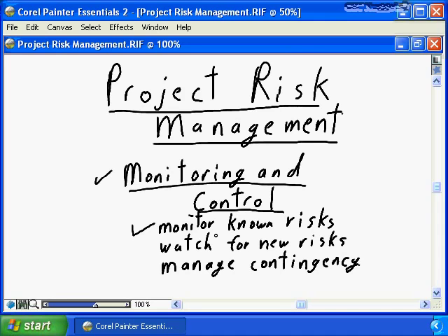The risk identification process we did during planning was as exhaustive and complete as possible. As the project delivers, you will understand new information, and new activities will be uncovered, and therefore it's important that you're looking for new risks. Again, you're going through the complete planning process to analyze, to develop strategies, to put contingencies in place to deal with new risks as they become known.